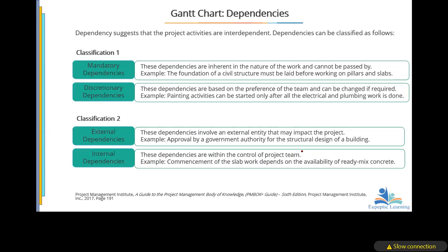You're going to use this for a road, so will it be able to stand the kind of stress and strain as far as the users of the road are concerned? So if within our organization or the team, somebody must do that before you continue, then it becomes an internal dependency. However, if the person to check this is outside the organization, then it's an external dependency.